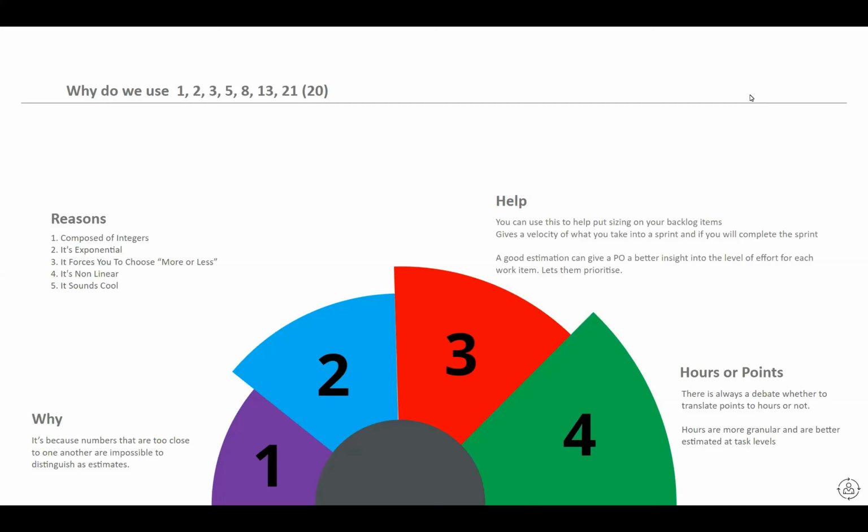Let me just flip that. How many kids can a parent have? When is enough, right? You know your capacity, you know your ability, so you know what's going to work for you. Now, there is an underlying rule, and it's unsaid, where it's about 2 teams per Scrum Master. A Scrum Master can manage about 2 teams, and then after that they start fizzling out. This is why they say don't have more than 2 kids. So probably about 2, and then it gets difficult because you're spread so thin. You are literally running from ceremony to ceremony. You can't improve the team, and it becomes tough.